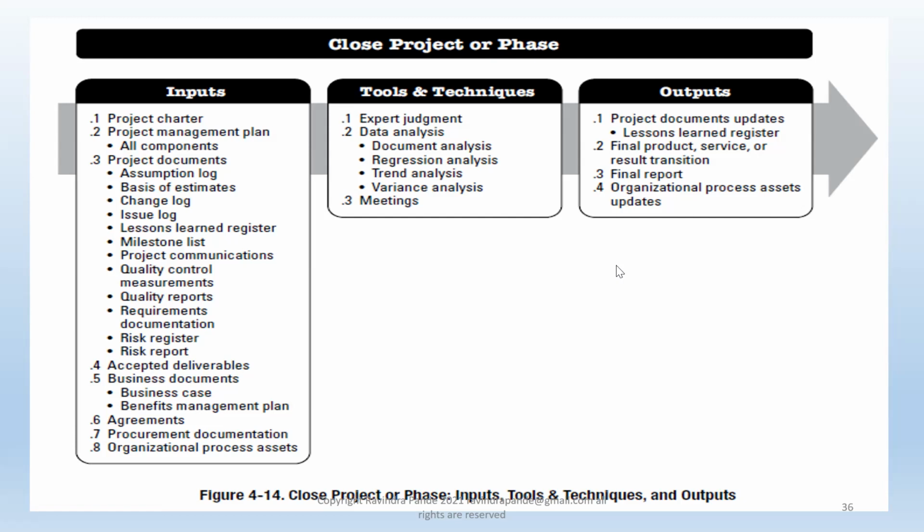If they are added in between, it means that there's a kind of communication gap, a kind of challenge of maturity of documentation, and that's a kind of red mark on your project. Then procurement documentation. What type of procurements have we addressed? Are they in time? Sometimes there are procurement delays and the project tasks get delayed as well.